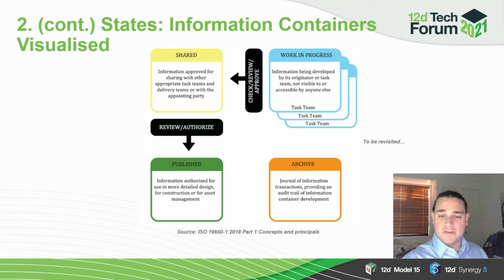Finally, we have our archive container or state, and this essentially provides us with a snapshot in time of information which is controlled and, in layman's terms, read-only. We can go back and check the information that has been archived, and we know the state of that information.